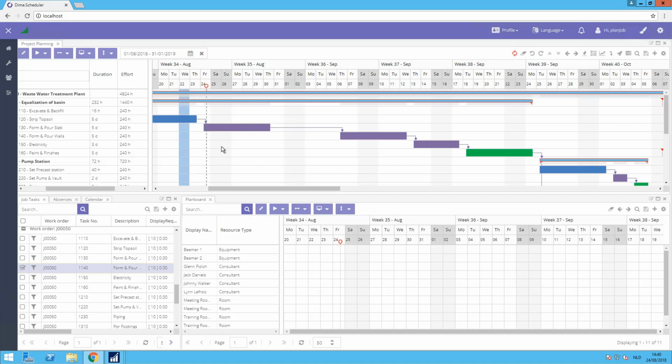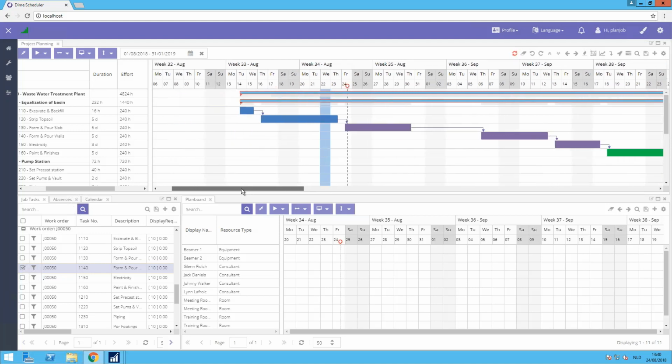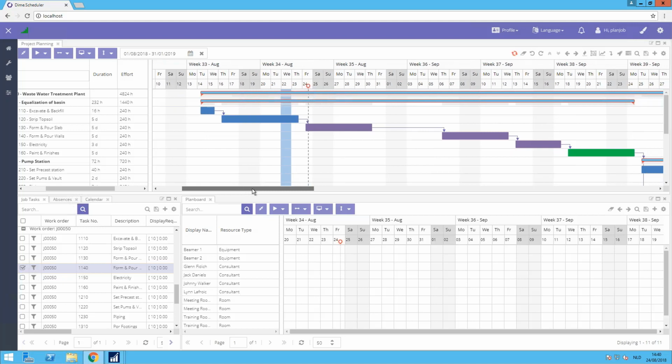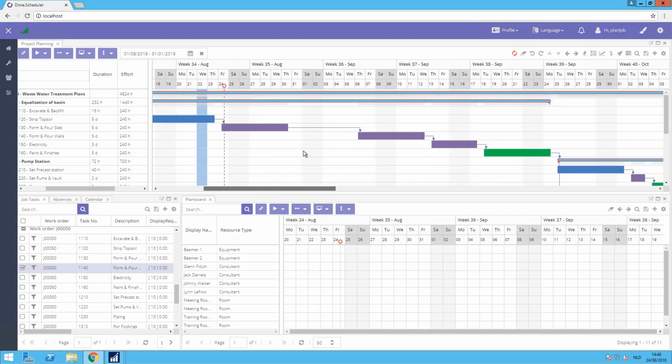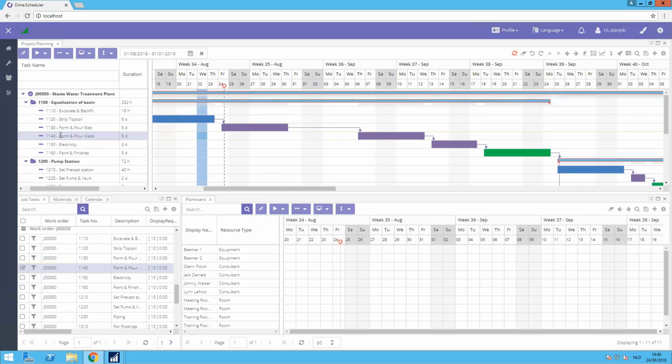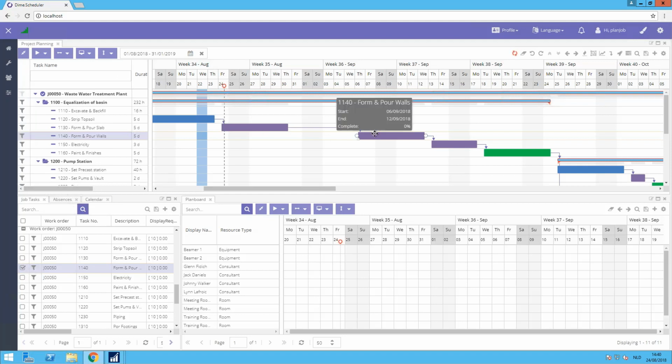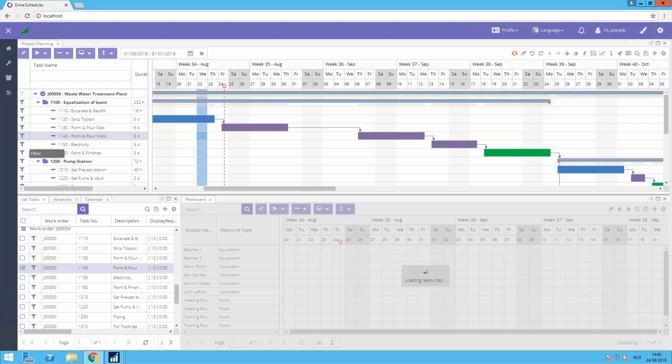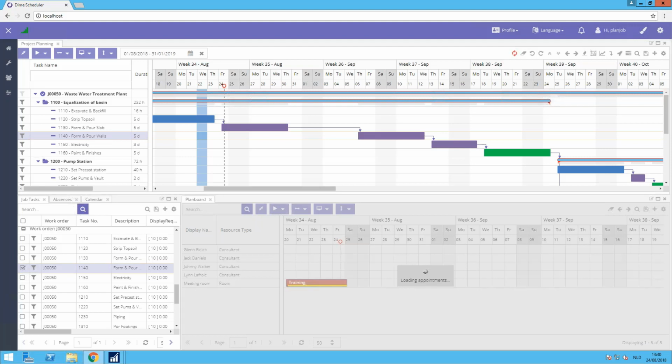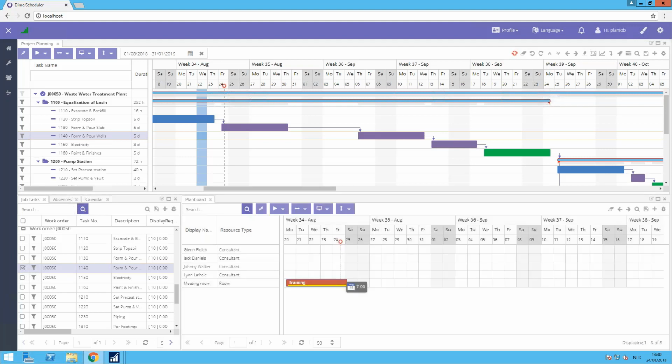Same counts for the effort. Now, based on that calendar that we have here, and let's take this task here from 6. So this one, we can now translate the planning of this task to the plan board after adding resources to it. So we could first of all start by filtering the plan board and to give us all the resources that are qualified to do this type of task. In that way, you will see at one glance which resource has availability currently, which resource does not.